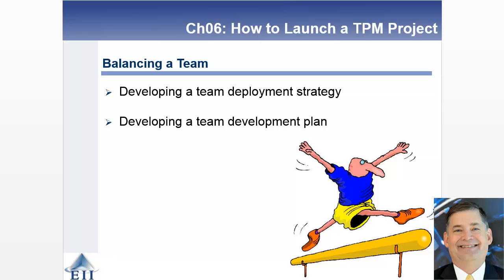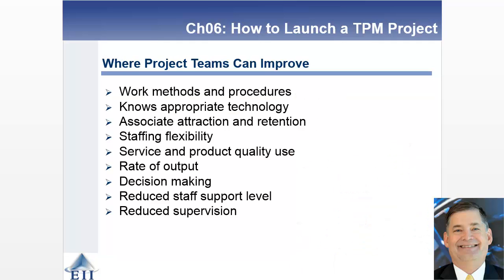One other thing I forgot to mention on contract team members: they're probably best for a traditional project approach. For the other project types, agile, extreme, emergency, you just run into challenges with contract members being able to come in and spin up to where you are in that particular project. It's high risk and high uncertainty already. You don't need to add to that risk and uncertainty.